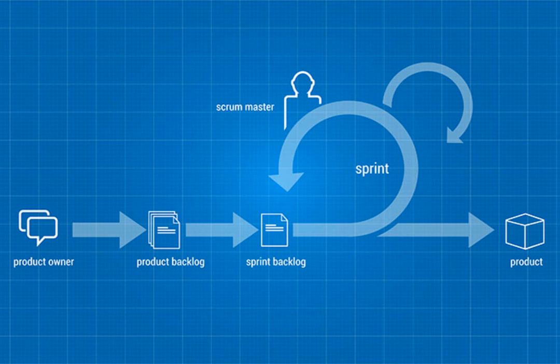The estimate is something we do during the sales cycle at no charge to the customer. When we start a project, if there are requirements we haven't had time to vet out in detail, we'll put user stories in our backlog called spikes. A spike is a story that says we didn't have time to flush out this technical concept or set of business requirements, so we allocate a little time in the first sprint — sprint zero — to further vet those things out.